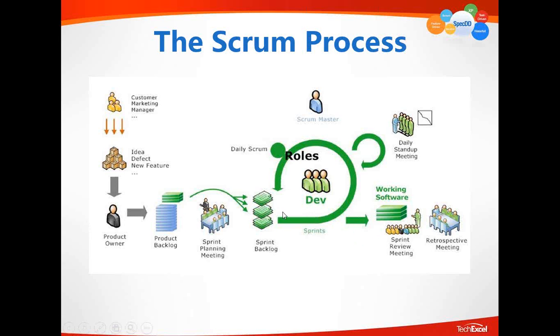And one sprint starts with a sprint backlog, which represents, on day one, the commitment of what the team needs to finish, all the features as well as the defects, and convert them into working software and deliver it so that the end users can use it. Every day this process is going, so this represents the daily stand-up meeting, the daily Scrum, or the daily Agile.